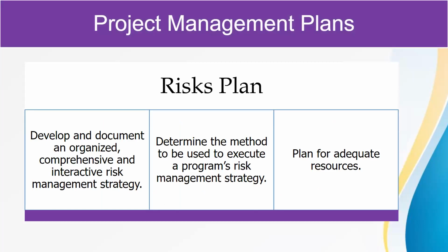Risk plan is very critical. And when we talk about risk plan, it's a document that we develop to make sure we have a clear understanding of the risk management strategy. So the number one thing we need to do when it comes to risks is to identify them. So we do risk identification in our risk register. We come and have a brainstorming session with our team to discuss all the potential risks that a particular project could be experiencing or could encounter.